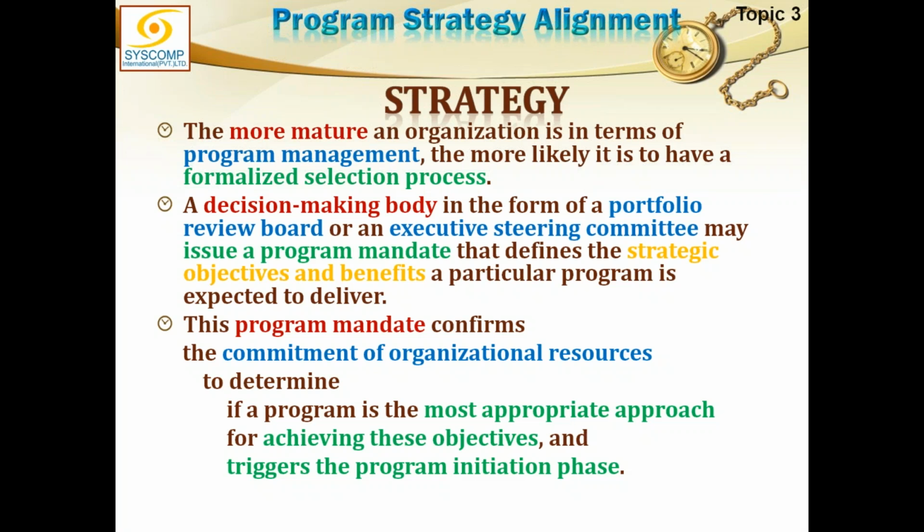The decision-making body, in the form of either a portfolio review board or an executive steering committee, may issue a program mandate. So even before a program charter can be developed, the program mandate is given by the executive committee. That defines the strategic objectives and benefits a particular program is expected to deliver. So in a way, this mandate will give you the requirement you are supposed to be fulfilling through this program.